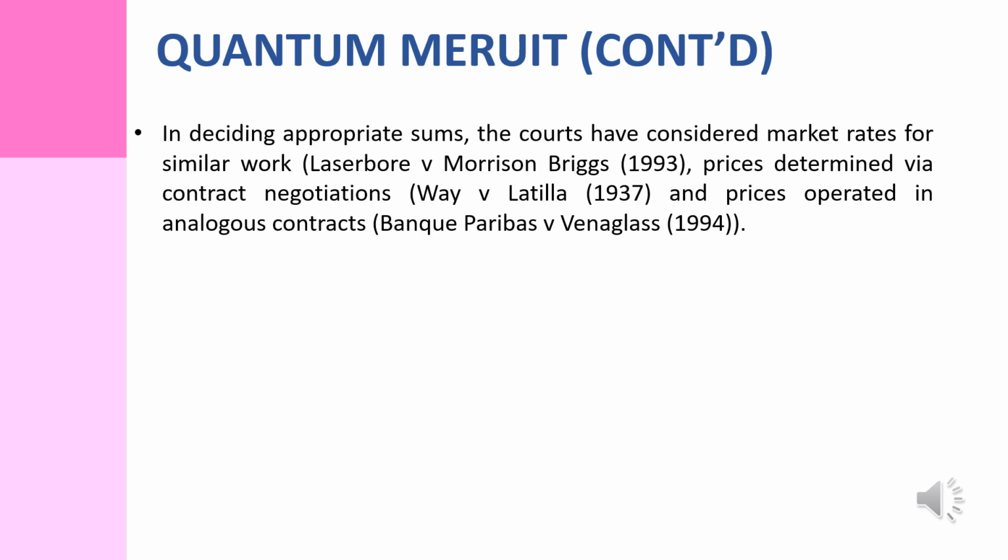Therefore, in deciding appropriate sums, the courts have considered market rates for similar work, in the case of Lesabor versus Morrison Briggs, 1993; prices determined via contract negotiation, in the case of Way versus Latila, 1937; and prices operated in analogous contracts, Bank Paribas versus Venegas, 1994.